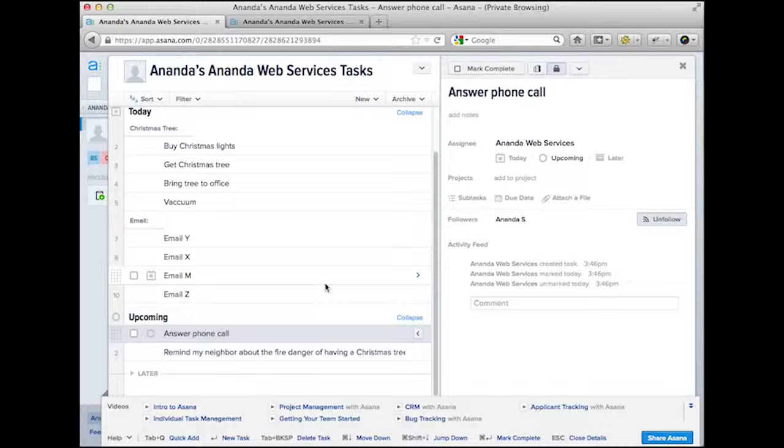It has about 150 tasks, things that you usually do when you're creating a new website. And whenever we're creating a new one, we create a copy of that complete task list, add things to it, remove things from it that are not appropriate, and then we can just go through that whole list and make sure that we're buttoning up everything like we need to, make sure that the site's going to be backed up, and that it's set up in the right way, and that the people who need to have the passwords have the passwords, and so on and so forth.